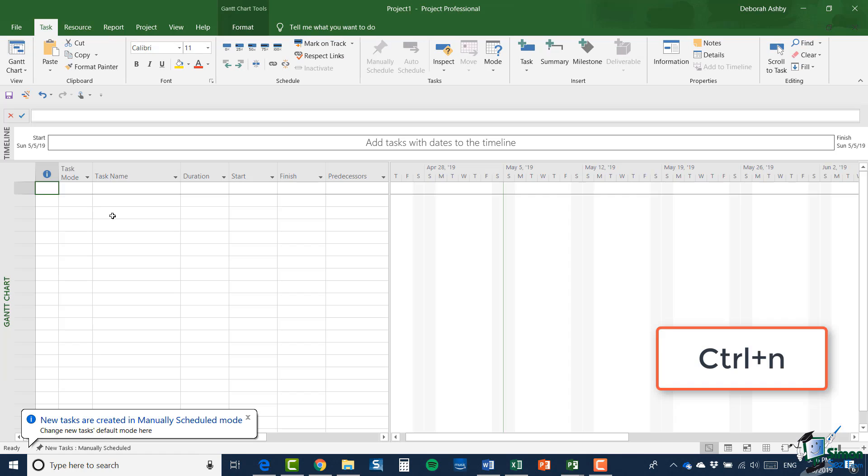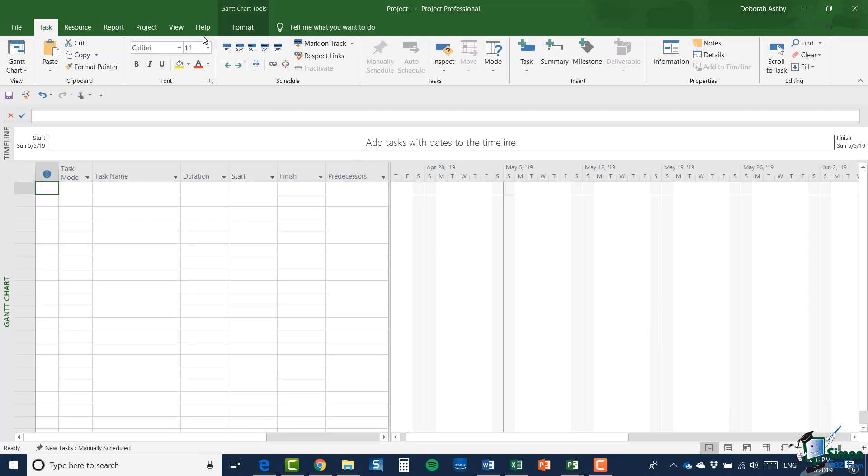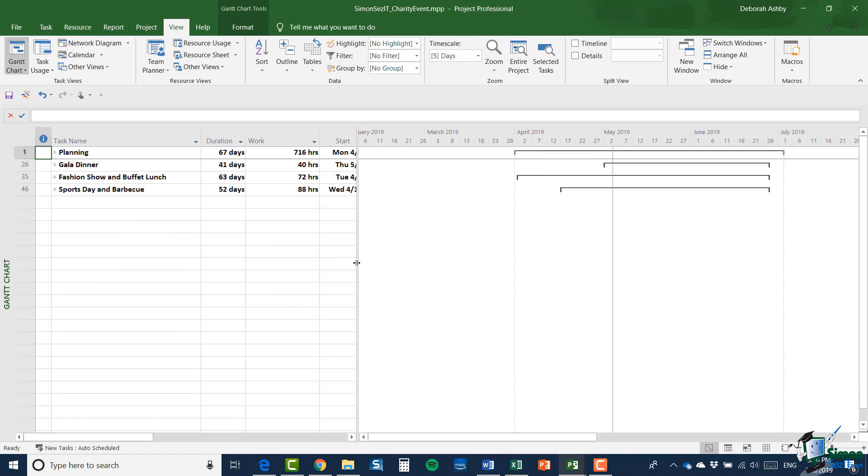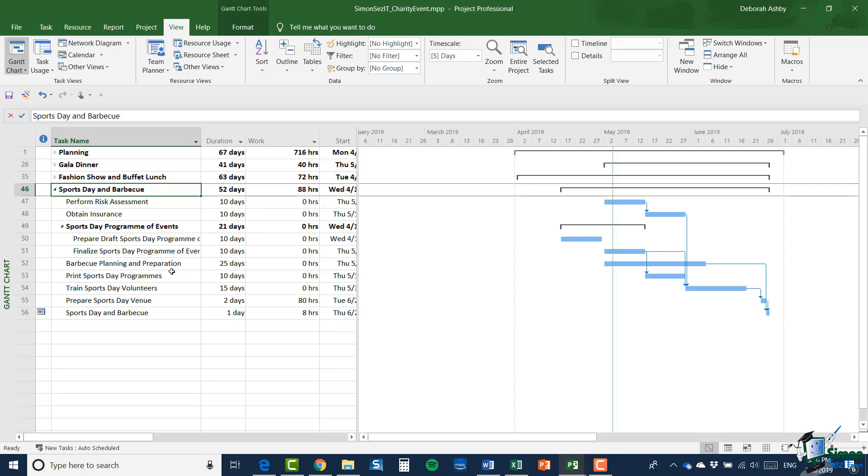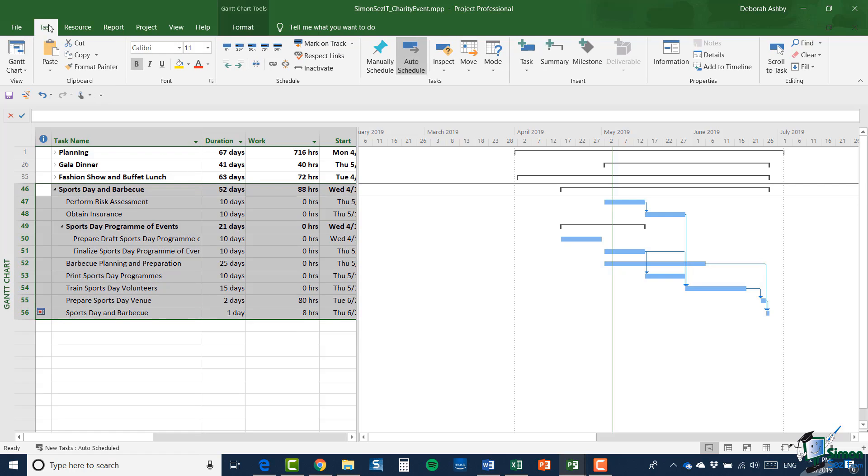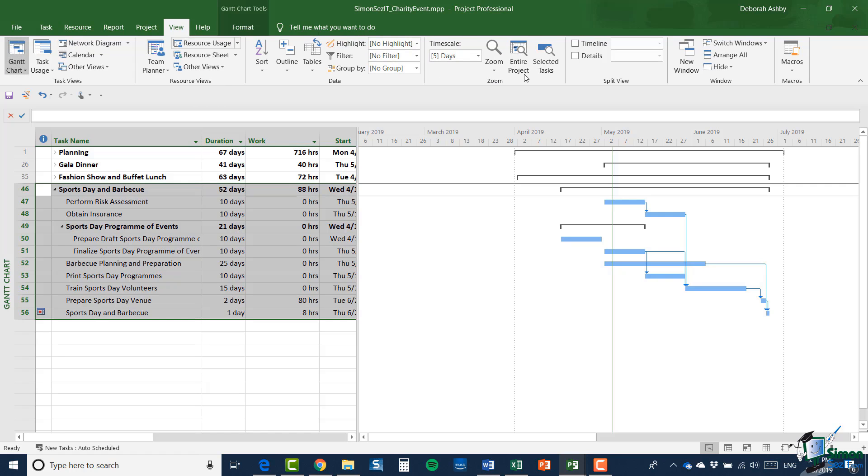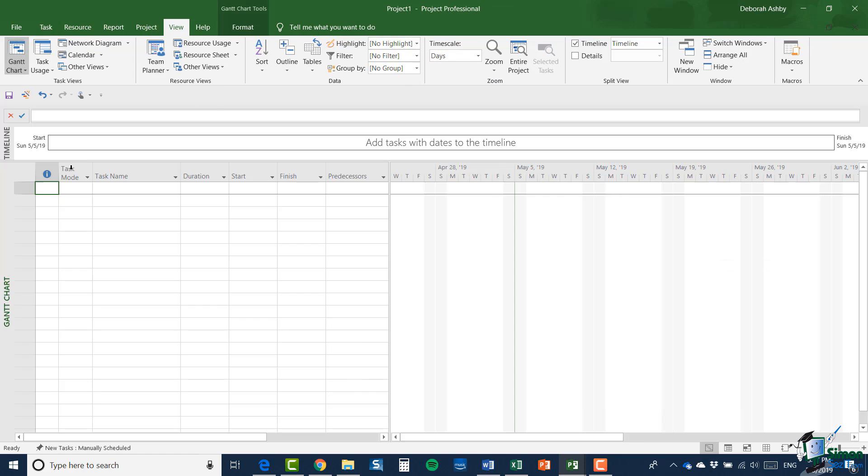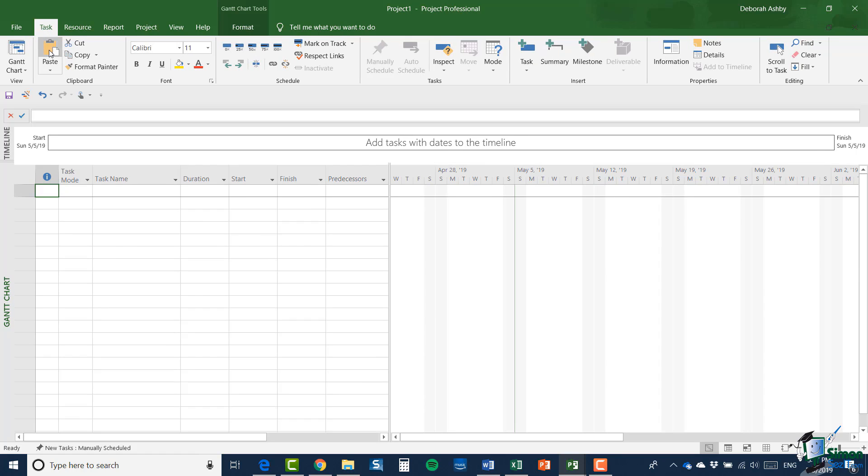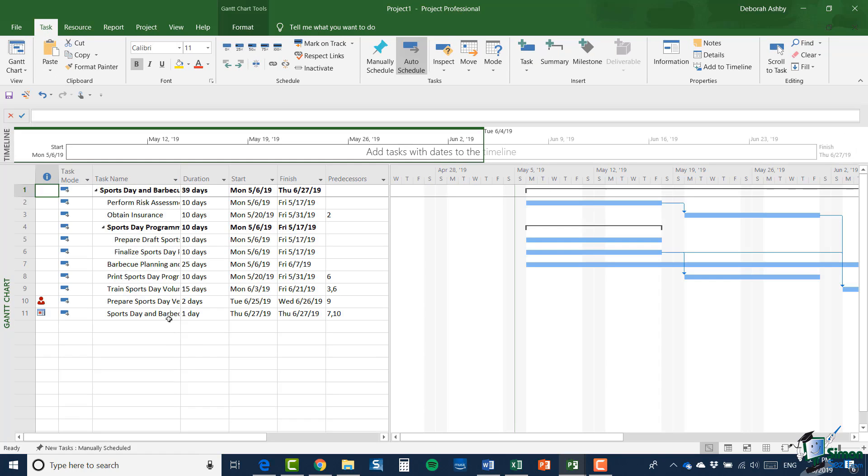So let's get started. Let's first of all, create an empty blank project using the keyboard shortcut control N. Now, let me switch back to my original project. And what I'm going to do is expand out sports day and barbecue. And I'm going to select all of those tasks. I'm going to copy them to the clipboard. And then I'm going to switch back to my empty project. And I'm going to paste those tasks into that project.